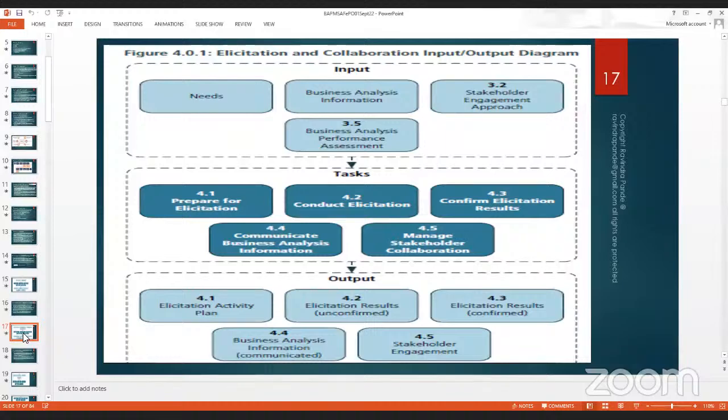We build something called a requirement traceability matrix, which is a kind of table, and we're going to study this in one session in depth. What is the RTM? This is referred to as an RTM. So whenever somebody asks you an interview question, what is RTM? RTM is requirement traceability matrix, which is a table where you normally have the list of requirements traced back to the discussion, data point, or file from which you extracted that requirement. Then you normally send this RTM for approval, with the list of requirements, to the given stakeholder, so that the stakeholder says, yes, you have understood the requirement, which is complete in its sense. So now you can move on to gathering other requirements. And once you finish gathering almost all the requirements, you might give this list, or transfer the knowledge, to the construction team, development team, as per the need, and as per the policy and process of the organization you are working for.